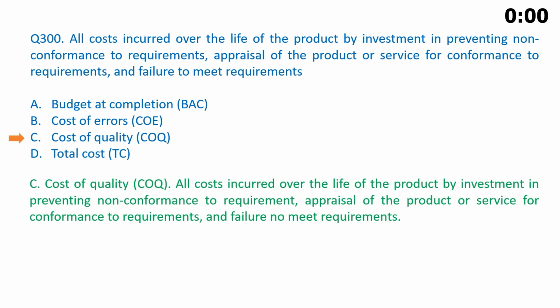The correct answer is C. Cost of quality. All costs incurred over the life of the product by investment in preventing non-conformance to requirements, appraisal of the product or service for conformance to requirements, and failure to meet requirements.